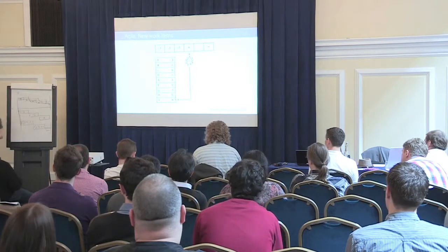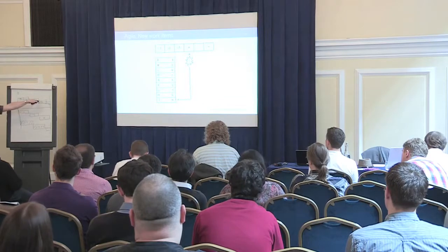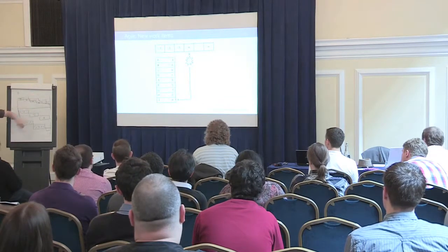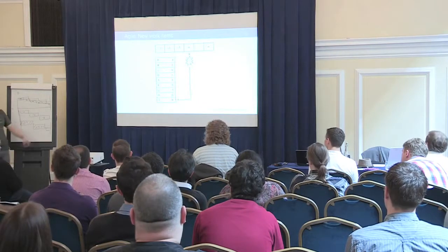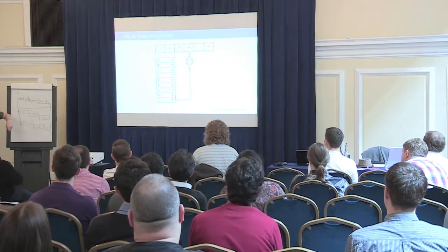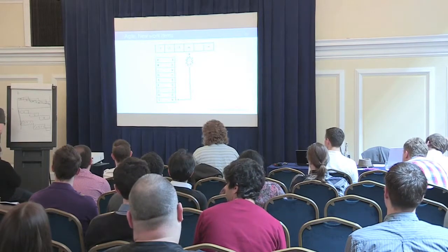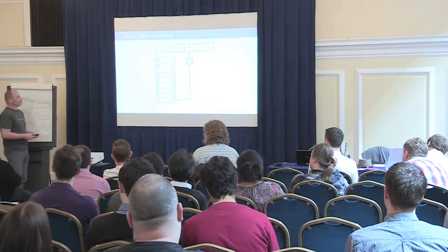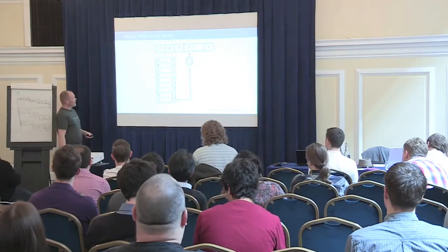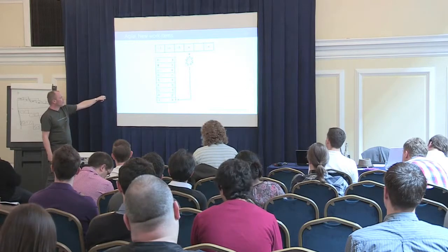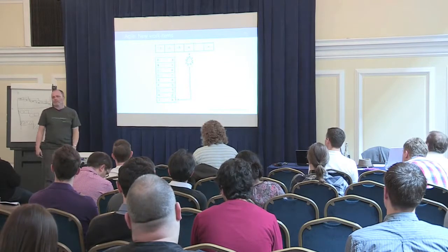So in an Agile project, any Agile approach, that works differently. As soon as you identify a new requirement, and I shouldn't have named it I, because I also stands for iteration, but anyway, maybe in the next book I'll name it K or whatever. So you find a new work item. The only thing you do, well, there are two things you should do: you estimate it on a point scale, which I'll talk about a little bit later on, and then move it into the backlog. That's it.